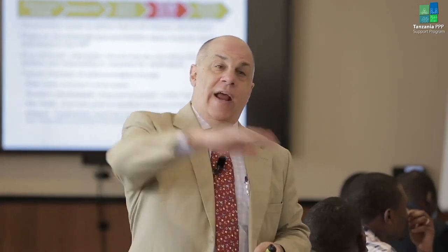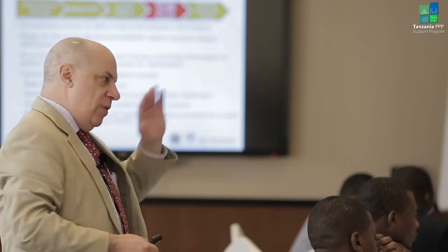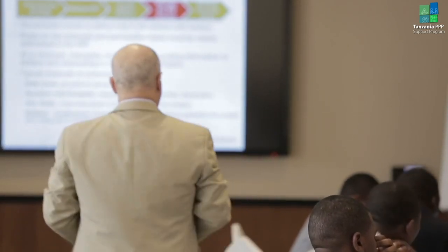Well, if you receive a question and you come up with an answer, you let everybody know what the answer is. But what you do is you keep the asker anonymous. You don't say where the question came from. The more information out there, the better.